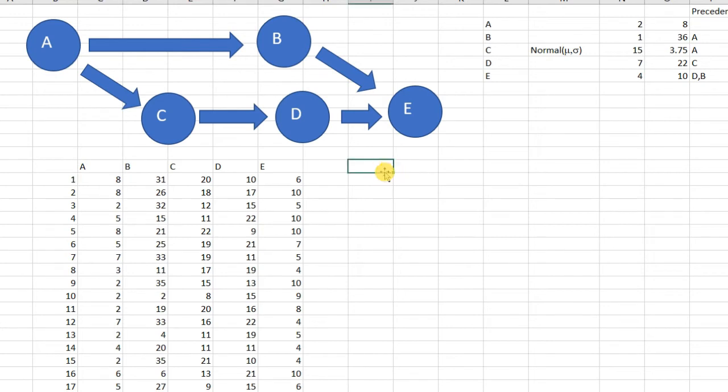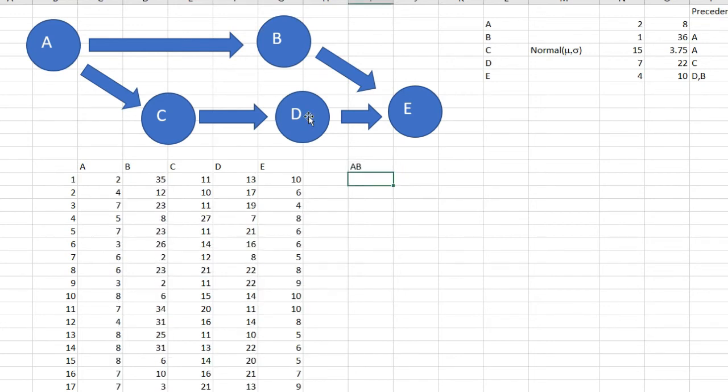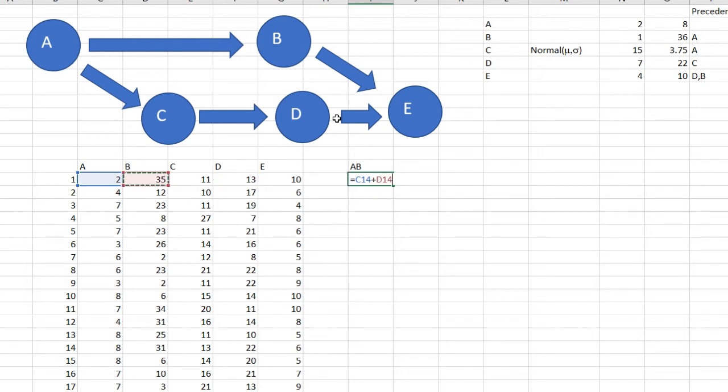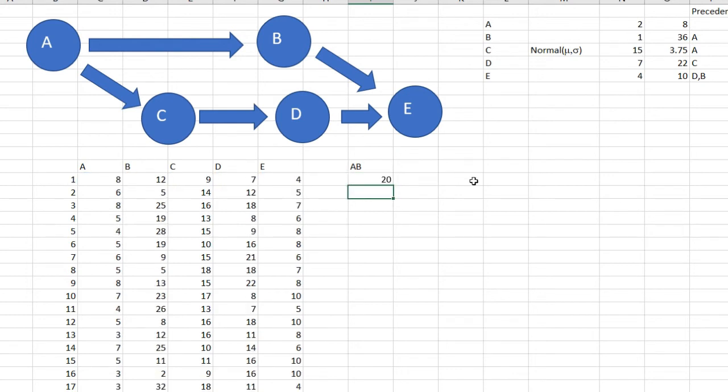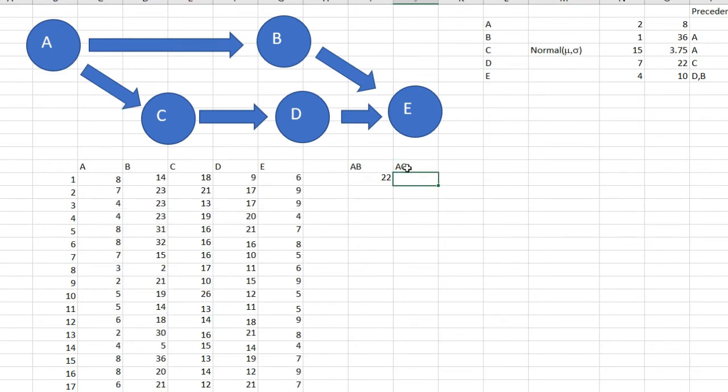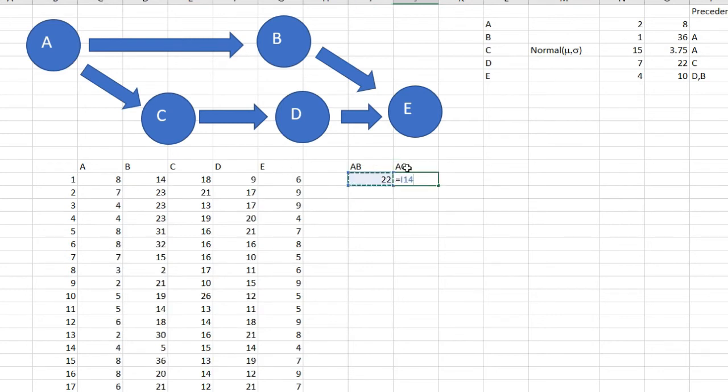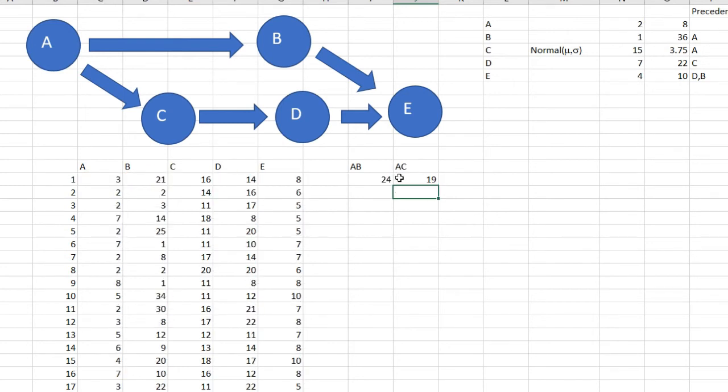Now I need the activity AB. What is the time to finish A and B together? It's going to be equal to the time of A plus time of B. In the second line here I have AC, and it's going to be C plus A. I'm going to drag it.